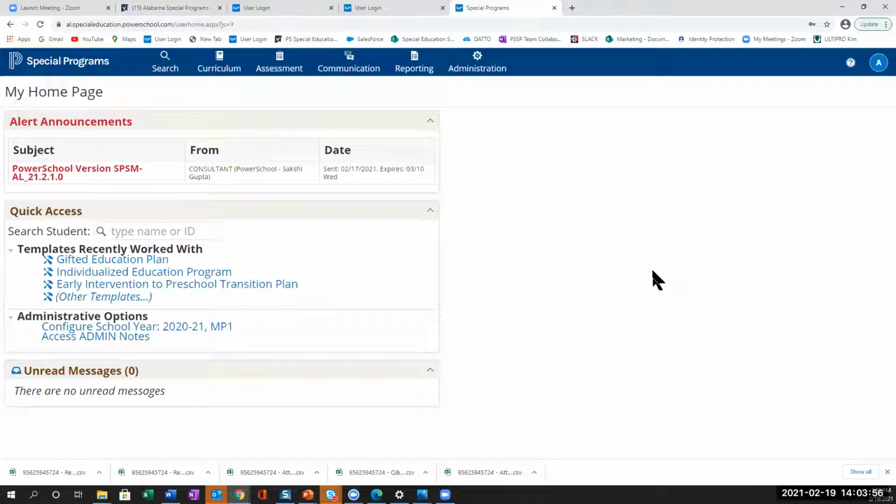They can't use the system yet because when we migrate data, which we're going to talk about when we come back, it is going to overwrite anything that a user might have done, right? Because we are pushing data into the system. So in order to protect the integrity of your data, it's important that access to your system be limited to only a very, very small number of users that are part of your core team as we go through this implementation process, okay?